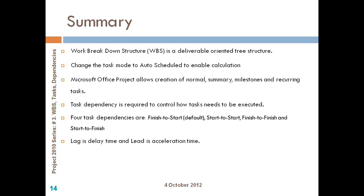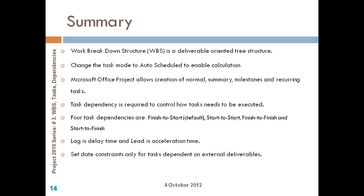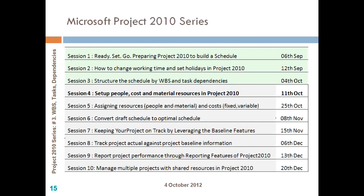If you want to have a lag time or an acceleration time between two linked activities, make use of the lag field at the predecessors tab to set those dependencies. And finally, we talked about some extra constraints when you have some external dependencies or deliverables, which cannot start as soon as possible.